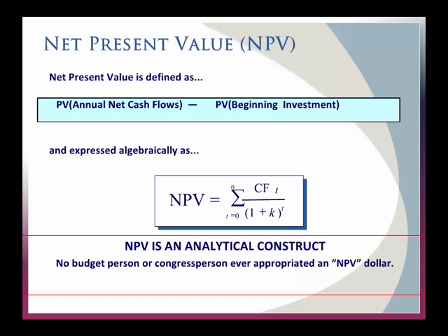And this is all I'm really going to say about net present value, is just how to compute it. But just know that because a lot of our procurements last over multiple years, you can't use a dollar figure in year one and assume that it's the same dollar figure in year N. So this is a way of modifying the cost of a dollar throughout the life cycle. In essence, this is making sure that you're comparing apples to apples and nothing more.